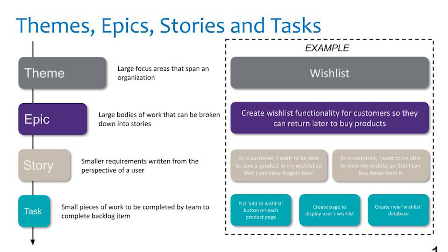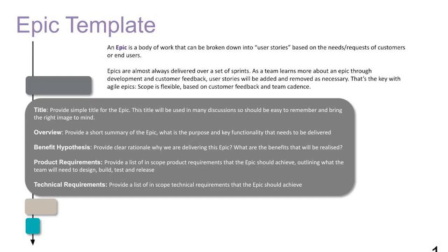What you should be doing is running an exercise of comparing bigness. So maybe not even put a number on it. Some organizations do, some organizations don't. But a good concept to grasp, regardless of whether you're agile or not, is measuring if it's a big piece of work or small piece of work, and that should not be done by one individual. A leader might have a really good idea of what the finish line looks like, but the teams are going to have really good ideas around it.